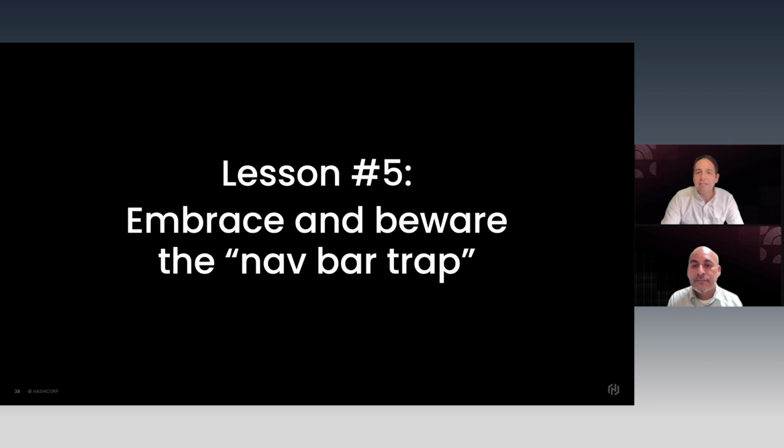Improving your docs IA is a long-term project that takes enormous effort and follow-through. It means creating design docs that describe the elements in their order on the page, that define terms and organizational principles explicitly, that connect the available functions in your content creation and management systems with the components that display the docs. There's no easy fix to it, and no single object or deliverable. Set those expectations early. We think one of the biggest potential pitfalls to this work is underselling the scope of an information architecture project to stakeholders.